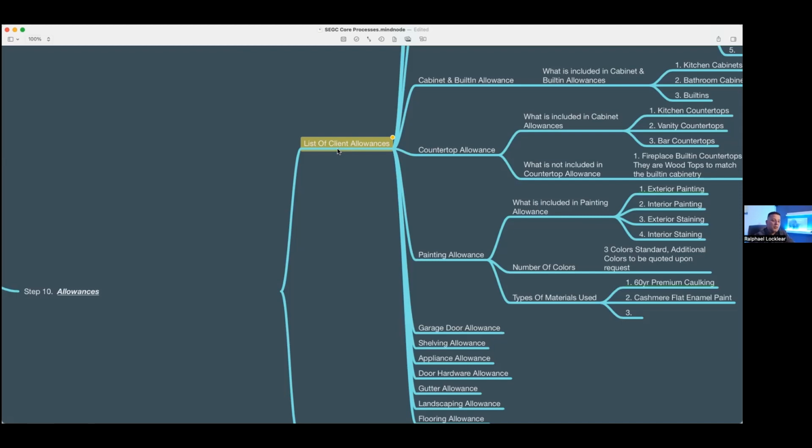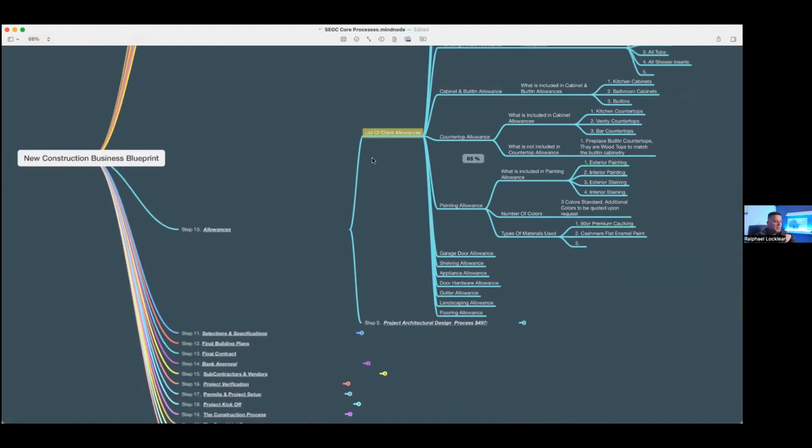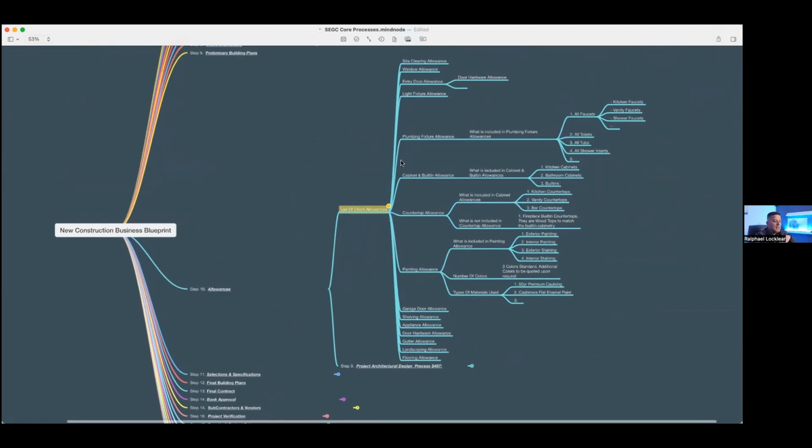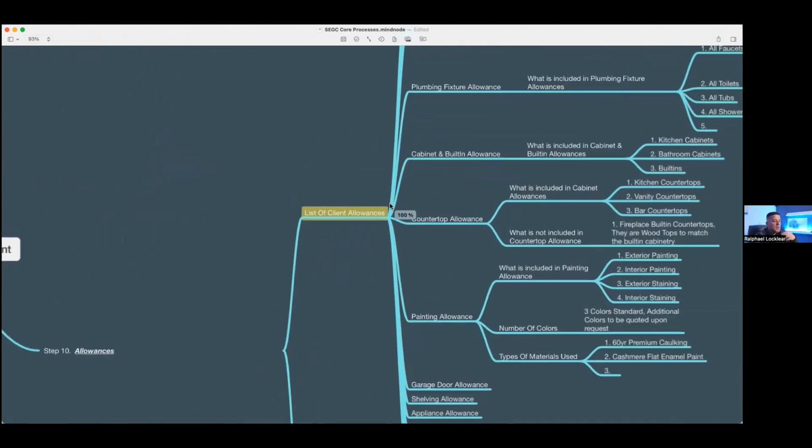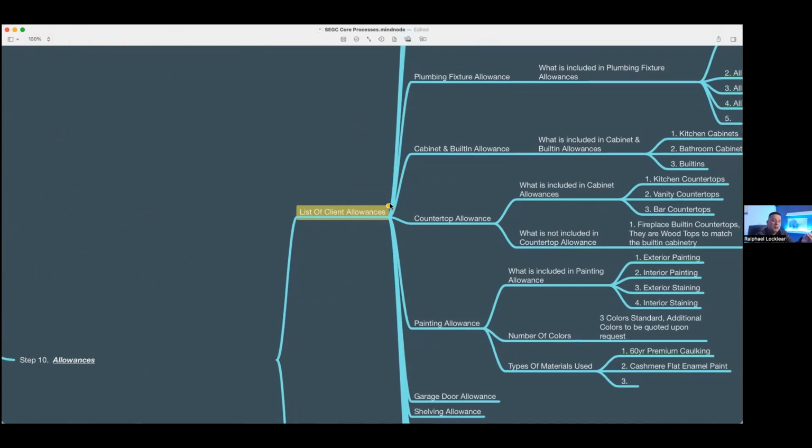A lot of folks, a lot of builders, everybody does it different ways, and it works for some people. For us, we could never get it to work the way we want it to work. So now everybody makes all the selections up front when they sit down and go through the design stage. And once those selections are confirmed to be within the certain allowance, then it gets added to the design, eliminating that whole problem altogether.